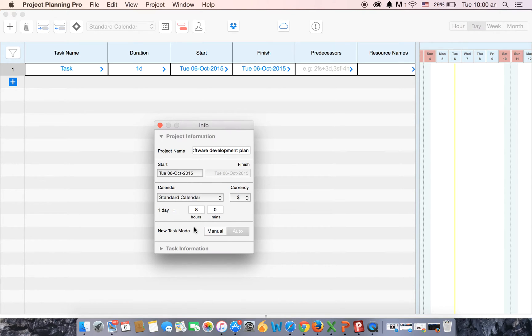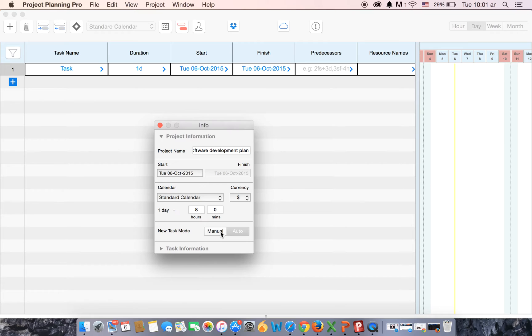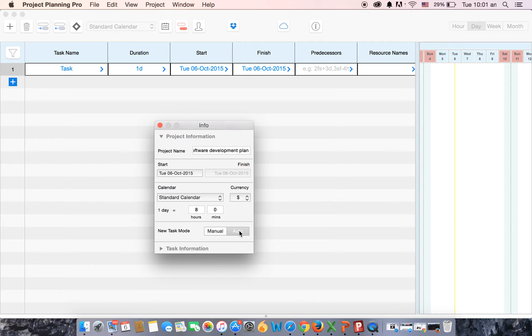Now the task scheduling options can be of two types. First is the manual option where you have to manually enter the start date and the end date. The other one is auto, where you just have to put the duration and the calculation of the start date, end date, and all the other parameters will be done in the background. So we have selected the auto option.